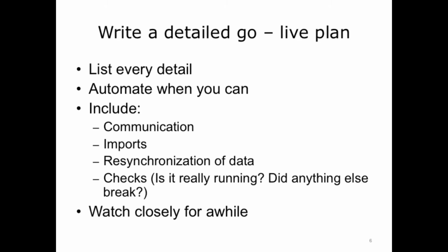When it comes to downtime, scheduled downtime may be inconvenient, but unscheduled downtime can lead to serious operational and safety issues. Allocate enough time to implement the change and check it and include a buffer. You may want to be extra observant when you first move to production. Sometimes a new change will break something unexpected, so watch closely for a while.